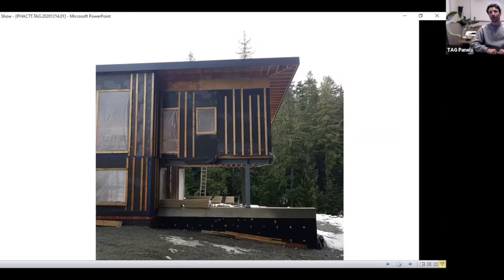There's no membranes or insulation. And we saw them tenting and trying to tarp the roof while it was snowing. So there's a huge amount of benefit to having the crew in there now. They're framing out the interior. They're nice and dry. I think anyone would want that. And then the overall quality of the envelope is going to be maintained, as opposed to this drying out that you see so commonly in all of these other stick-built projects.